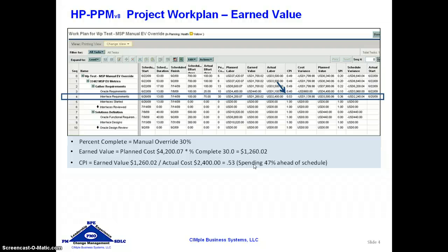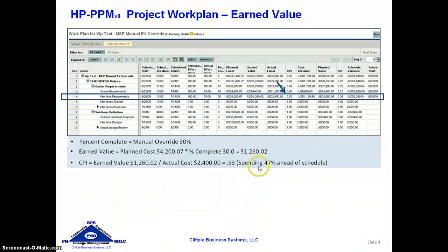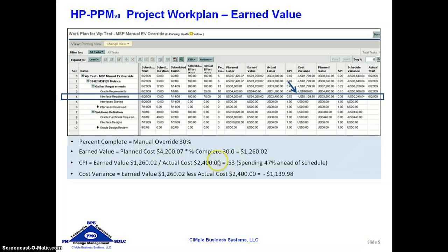If the CPI is over 1 that would be considered favorable, but it's very dependent on your understanding of what was planned versus what is happening before you can make that determination. This is just an attempt to raise a flag to say here's something you need to look at. The next element is the cost variance, which is an attempt to monetize the cost performance index. It is the earned value of $1,260 less the actual cost of $2,400, which means you are $1,139 ahead of your spending curve — and that's all that means.